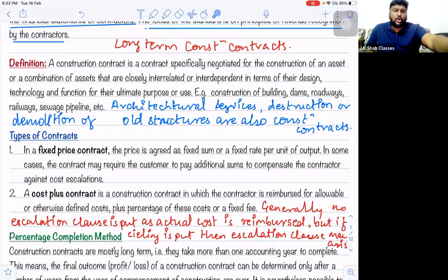Right? So the contractor may go for some higher charges so that his profit margins will be greater. So in such cases, the ceilings are applied by the contractee, who says beyond 5 crores, you should not spend. If you spend beyond 5 crore, I will not pay you. So please now understand one thing.